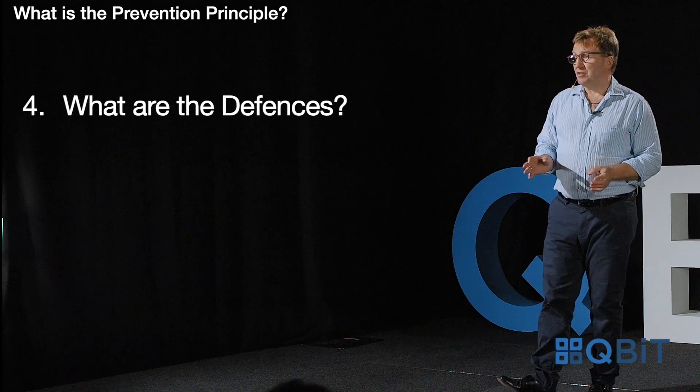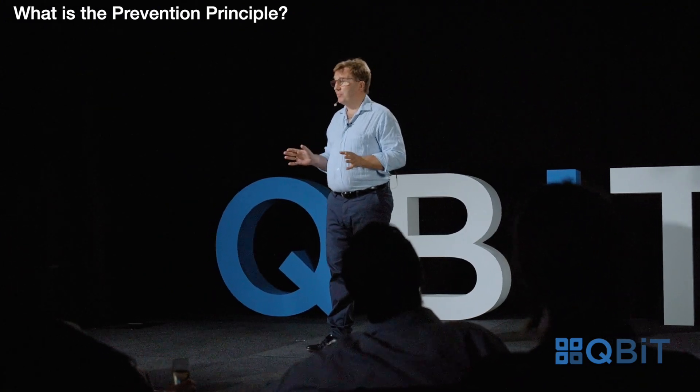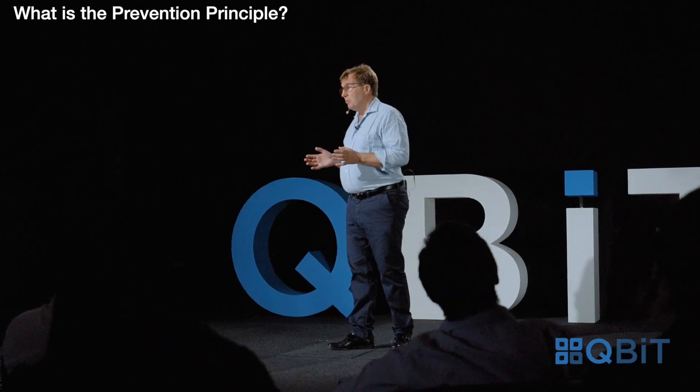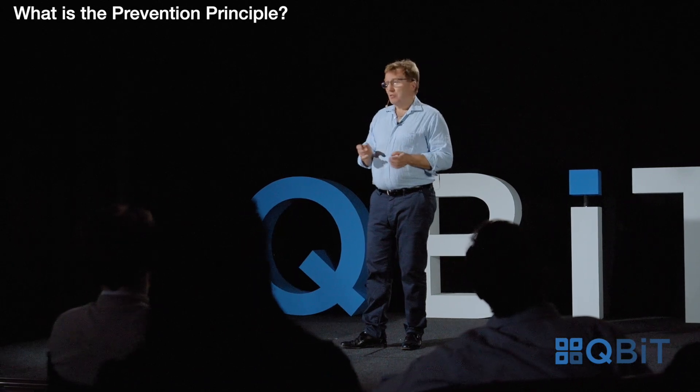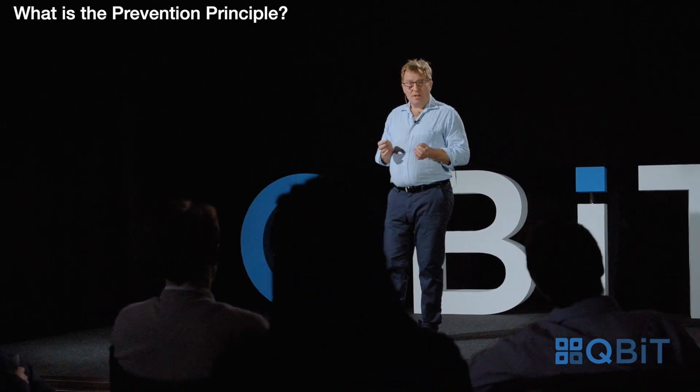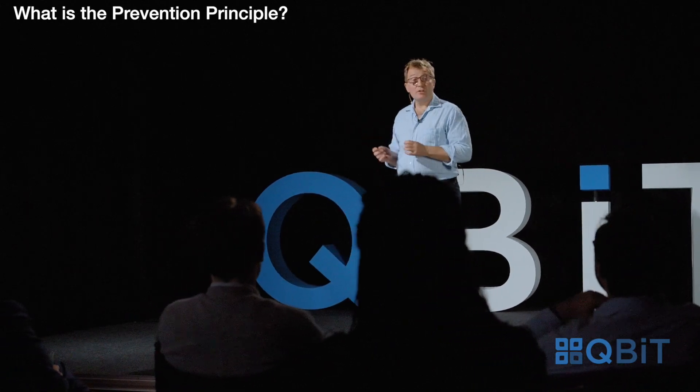What are the potential defences? First, on the proper construction of the contract, the party in default may be found to have agreed to perform even if the other party has hindered or prevented that performance. Secondly, the application of the prevention principle may be excluded by the terms of the contract, and that can arise in two ways: the relevant act may be expressly dealt with by the terms of the contract so there's no need for an implied term; or there may be a term which excludes or restricts reliance on the prevention principle — though you need clear and unambiguous language if the contract is to have that effect.